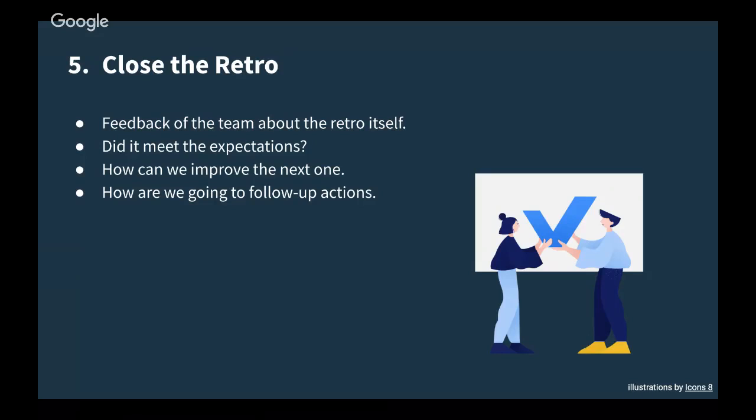Basically, who will be responsible, how we are going to do it, how we're going to review it, and all those follow-up actions are a great point to start your next retro, reviewing how you did, and whether the actions were important enough to do.